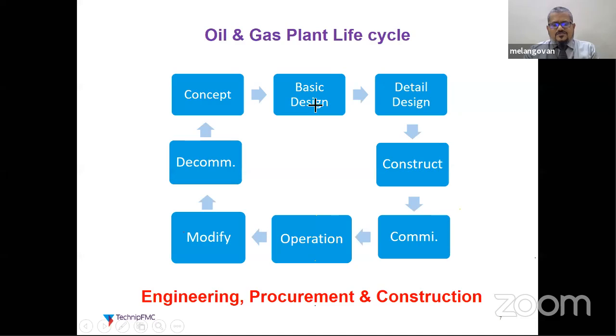Then the project moves into the basic engineering, where some more details are added into the design, and into the detailed design stage, where everything is fixed, frozen, the design freeze stage. Then it goes to construction, then commissioning. After commissioning, it is handed over to the owner, who is the operator of this plant. The operation is going on.